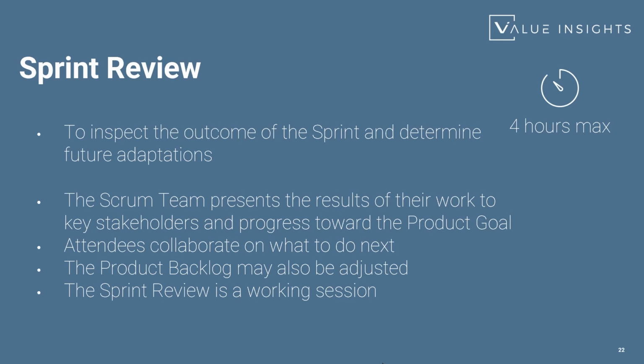And at the end, the product owner for the next sprint, at the sprint planning, will decide finally what to do. He or she, of course, may decide it before the sprint planning. But the idea is you receive feedback from your stakeholder and you consider really based on their feedback what to do next. At the end, the product owner is still sovereign and decides what will go into the next sprint. But it's very important to listen actively to your stakeholder and proactively look for their feedback.